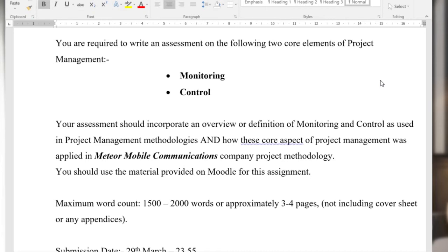And technically you can have some items that are not completely finished. They're still outstanding. So there might be small or minor issues that need to be reviewed in maybe 1 week's time or 2 weeks' time. So we create what's known as an exemption. So we've passed toll gate 1 with the following exemptions. Some further work is needed on this activity, some further work is needed on this costing and so on, but this will be finished in 2 weeks' time and it has been actioned to one of the project team to complete this work. So we have these exemption requests. That's what they're formally known as in terms of documentation.